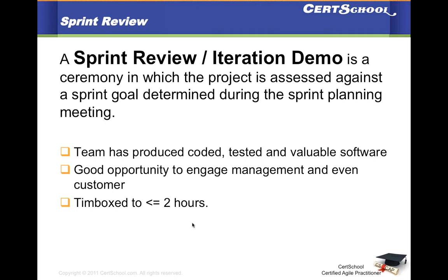Retro can also be time boxed. Usually retro can take anywhere from an hour to 2 hours, depending on the size of your team and the size and the length of your sprint. And sprint review is something that is similar, but more focused on seeing what you completed. Whatever you completed, you are doing a demo of that. You're showing it off, what you have actually completed. So the focus is entirely different, though they both happen at the end of the sprint.